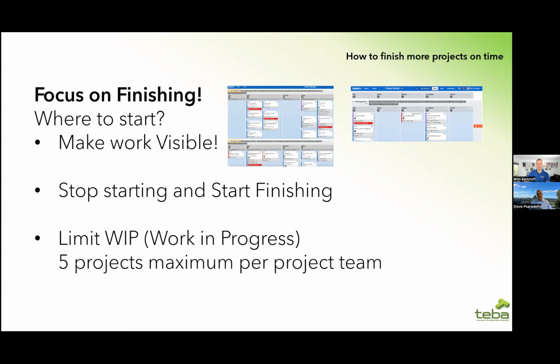Now, truth is that some projects have natural gaps. So you might do this project and then you're waiting for a month or 2 for the client to do something, as an example. They might be moving office or waiting for a delivery for something. Sure, during that gap, obviously we start other projects or we continue other projects. But at any given time, we don't have more than 5.